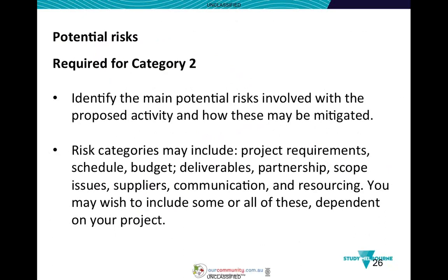Now, risk is a requirement for Category 2. You're required to provide very specific details. For those of you who may not have a risk management template, there are some great templates available from WorkSafe Victoria. But it's really important that for Category 2 applicants, you identify the main potential risks involved with the proposed activity and how these may be mitigated.